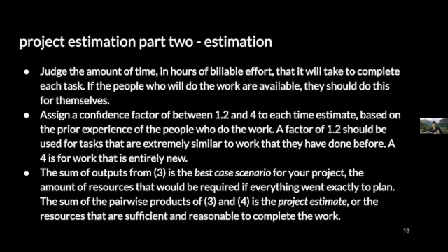A few points about this. If possible, if that person is available, the person who will actually be doing that work, or the people who will be doing that work on each task and subtask, should be the ones making that estimate. The only exception I provide for is very early career people who really don't have any good track record doing work to spec, and then understanding how their initial feelings about how that work went correlated to how long it took. So if you're more senior people, you should sort of guide them into reasonable estimates, but they should still be involved in the estimation process.